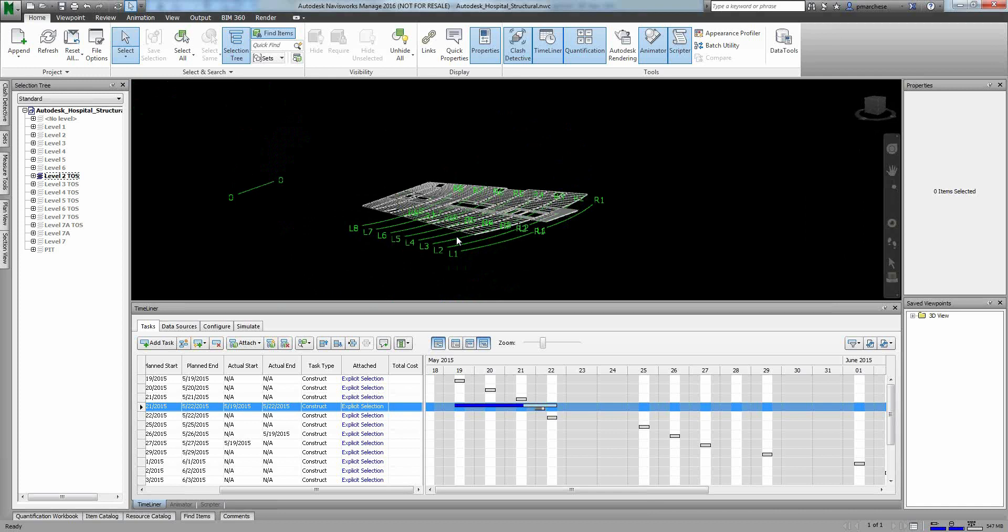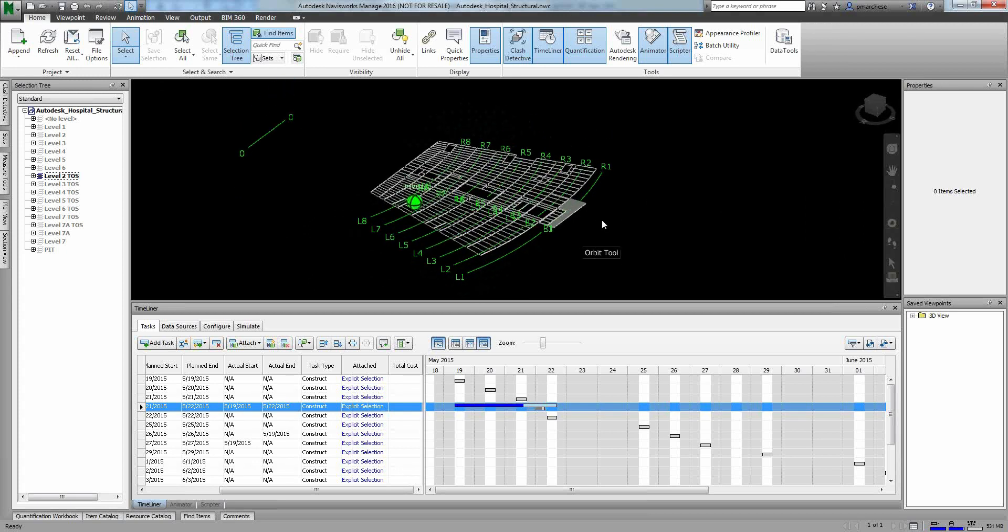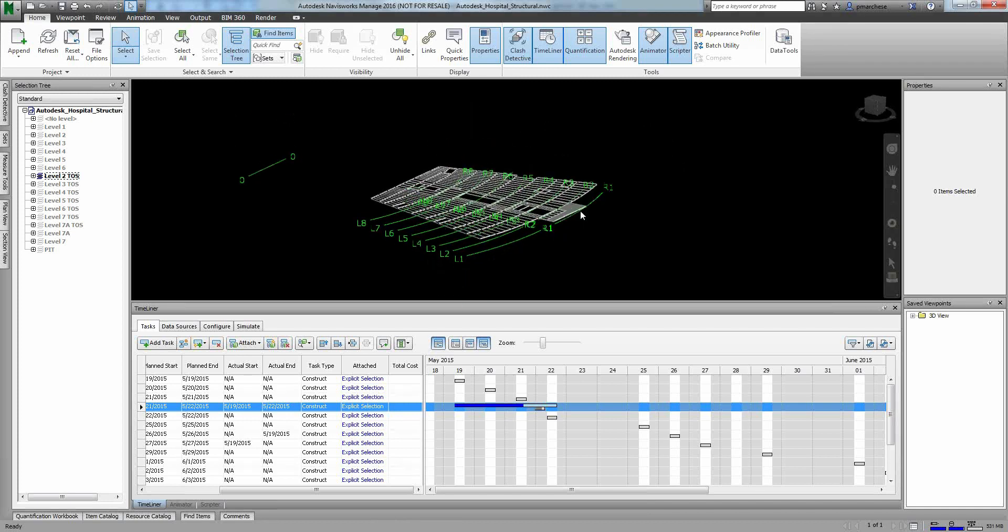What you typically will end up doing on real projects where you have things that you know are going to adjust - you're not just trying to do a one-off presentation, you want to utilize this to help track the actual project flow. You want to make sure that as the project schedule changes, where are you? Where are things supposed to be? There are some construction sites that keep one of these up to date and they actually set up the angle to match a camera that's on site. So that way they can look outside and see, okay, this is what I see here. Why is the model saying we should have more work done over in this area than what I can actually see outside? So you're able to use that as a check essentially.